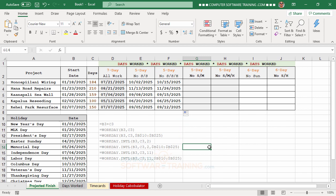The dates extend out a bit further because some of the projects fall within holiday ranges, making a noticeable difference in the projected completion dates.